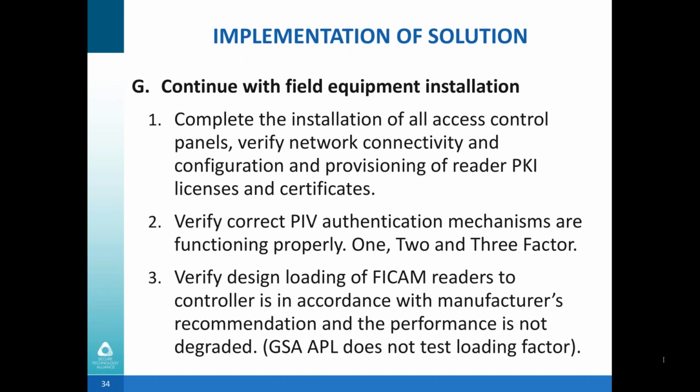The loading limits of FICAM readers to a controller should have been covered in the design, but since traditional and FICAM PACS differ, the processing loads and requirements differ. Sometimes this is overlooked by installers familiar with the brand, but not familiar with the PKI requirements. Be sure to follow the manufacturer's recommendations during the design phase and verify it's being followed in the field.